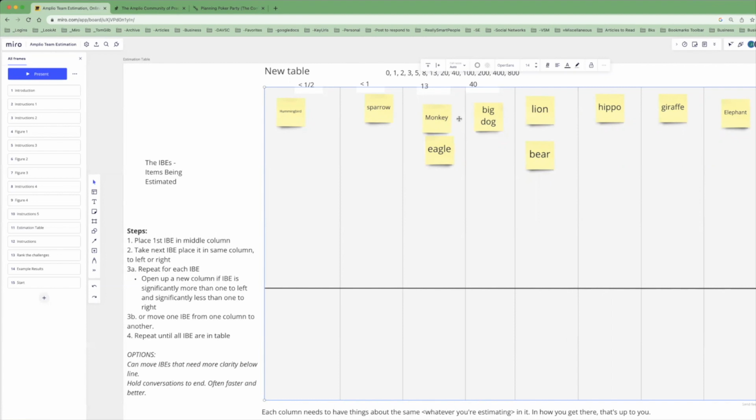If you're trying to create a product backlog, or go from a product backlog to an iteration backlog, then yeah, we've got to split these because they're too big. On the other hand, if I'm just trying to create what's going on in the product backlog and I don't care about the details, like when we did estimation for marketing, everything was about 100, 200, 400, 800, and this keeps going up. After 800, it's just really big, so then you don't need to split it up.